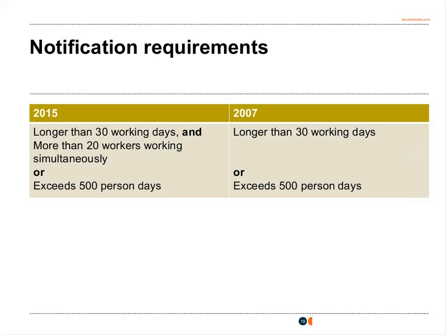What is important about notification now? Well, as a CDM client, you still need to notify a project to the Health and Safety Executive on your F10 form when you anticipate that a project falls into the notification definition, or as Alex said, when it's scheduled to. It used to be that notification was the CDM coordinator's responsibility.